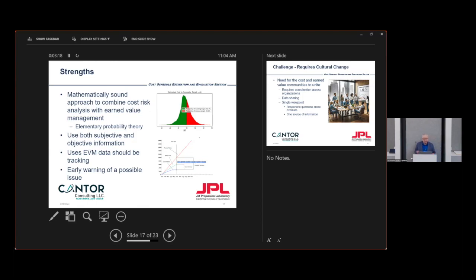So it combines subjective and objective measures, or it combines methods like we've learned in the previous two charts: for bigger tasks, if you want to track at that level, we take the initial priors from these parametric models and we apply the earned value measures at that point.